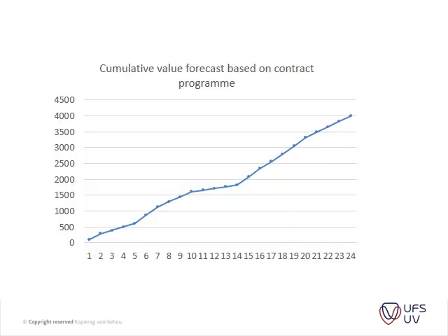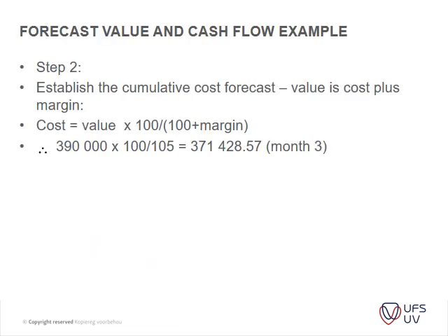Okay, so easy on Excel. You can just plot your cumulative value forecast. So remember, this is your value forecast, according to the BOQ. Very simple graph. So this is your S curve that we've created. So now, forecast value of cash flow example.